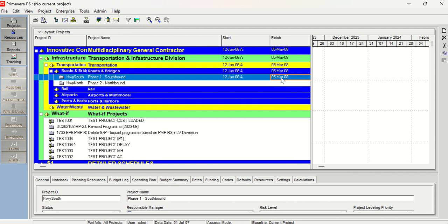That's what happens when you choose the option to summarize the project. But keep in mind that whenever you change the data date or make changes, you have to summarize the project again and again, and only then will the summary level show that the information has been updated.